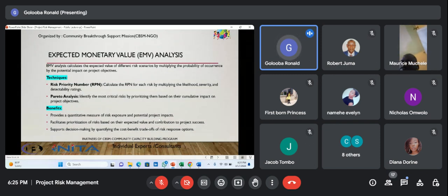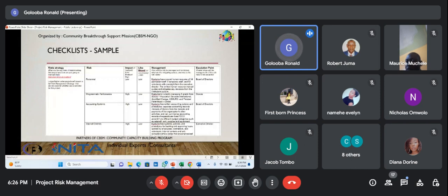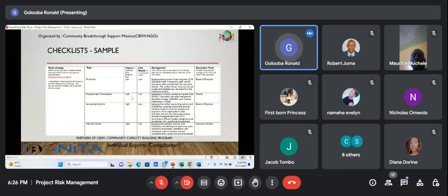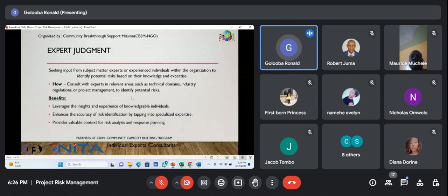So, for example, if you say that the likelihood of a risk to happen is high, then you have a rate for that, and at the end of it all, you multiply it based also on its impact, and also how easy you can detect it. So you come up with these scores. For example, while you are ranking here, high impact on the project is say 5, moderate 3, and low 0. Then you're able to come up with those at the different stages of impact, likelihood, and then you probably also include a column on traceability, and then I have a rating on that.